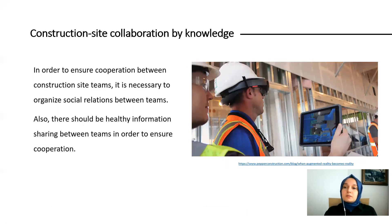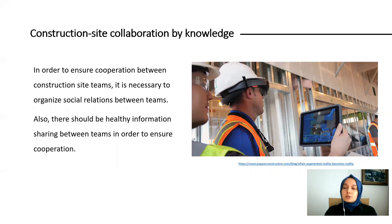In order to ensure cooperation between construction site teams, it is necessary to organize social relations between teams. Also, there should be healthy information sharing between teams in order to ensure cooperation and implementation. Results showed that, with the help of model information centers and tablets, the site teams had accurate application information. Benefits found include document management, real-time data sharing, construction coordination, and accessing up-to-date models on site.